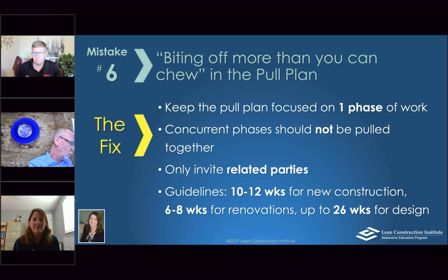So if you don't have activities that are a part of that pull plan, you shouldn't be in that session, because that's going to, first of all, waste those people's time, which is disrespectful, but it's also going to lead to tangent conversations that aren't related to the matter at hand.